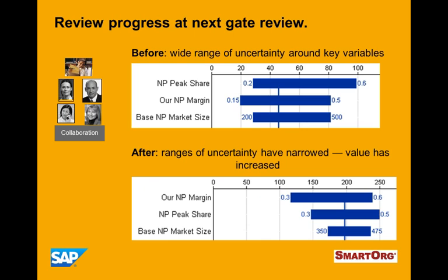And by the way, this is a very important issue: you want to update that data at critical stage gate reviews or phase gate reviews to see where things have changed. And as a result of learning, which is very important, learning as a result of doing these investigations and this analysis is part of the process. We have now learned more about the market. We have learned more about the technical features and such.